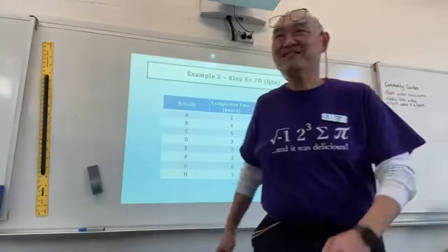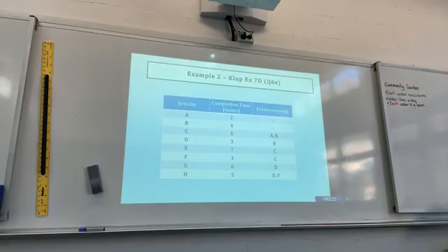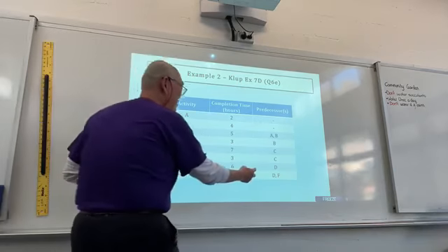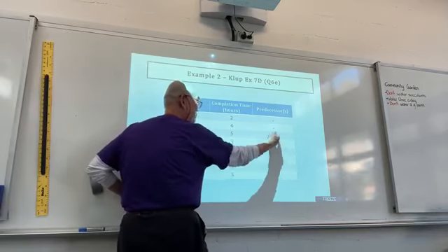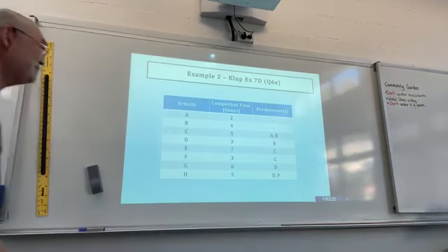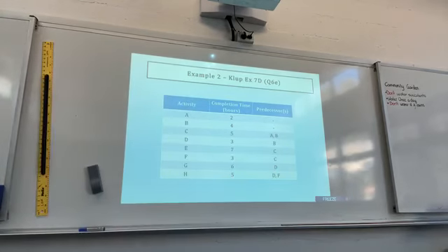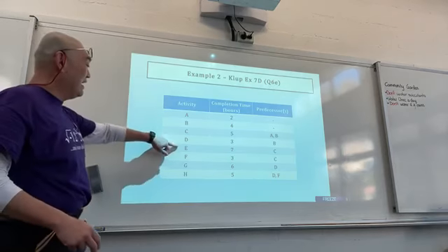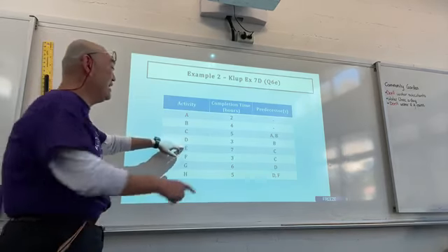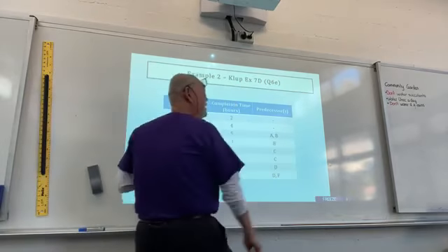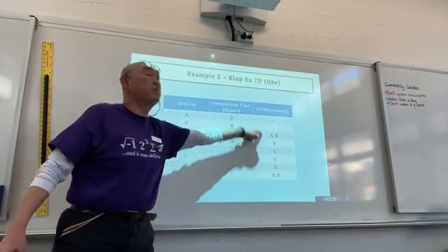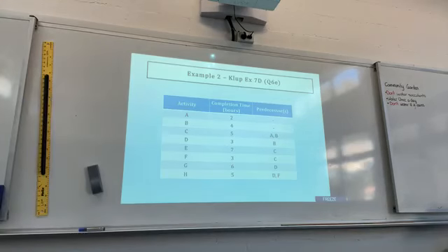You need another dummy activity. Alright, my fault. There should be two dummy activities here, this bit and that bit. I did not read the table carefully. What happened is I forgot that there's nothing after E. E is not a predecessor for anything. It should go straight to the end. Easy to make that sort of mistake, especially in the exam.